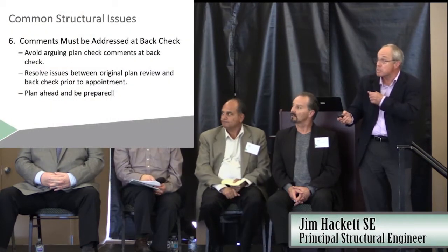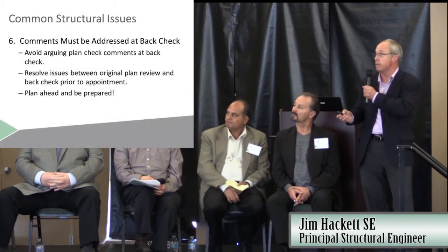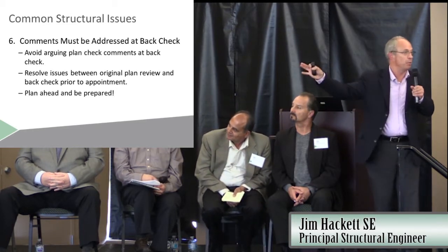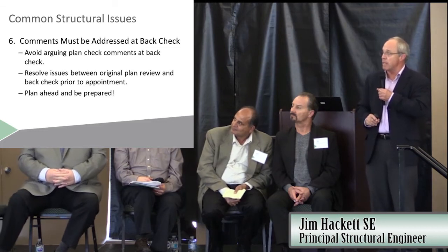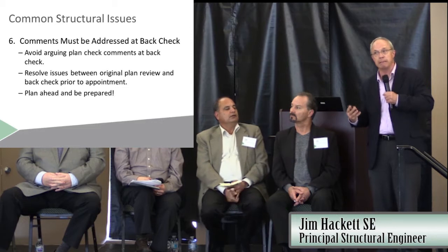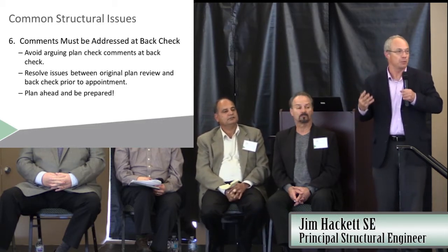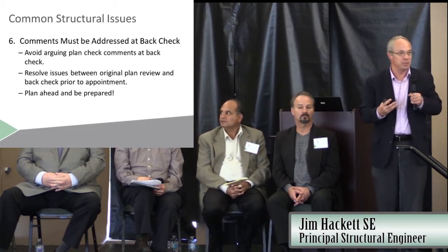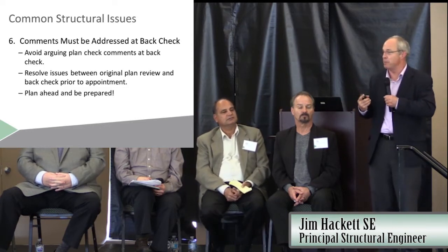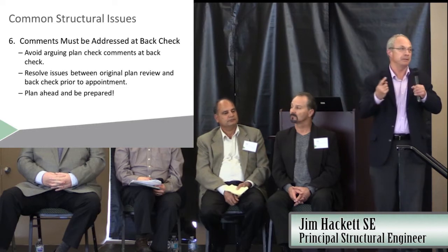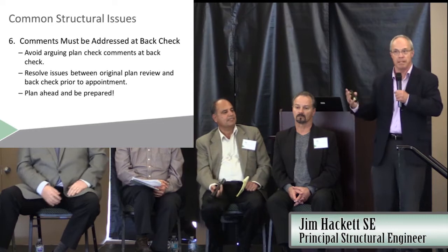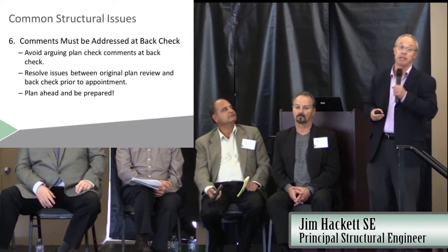And number 6, comments must be addressed at back check. I wouldn't say last but not least, because this is an important one, and I think we've talked about this quite a bit already. When you come into a back check, if you are not fully in agreement with a comment from a plan checker, try and get that resolved in advance. If you can't, you've probably added a day or two to your back check. And that's money, and that's time, and that's pain on everybody's part.